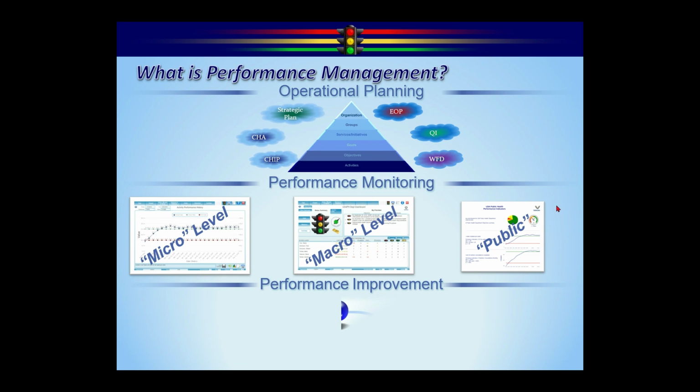The final step kind of is that performance improvement cycle, PDCA cycle. So you built the plan, you're executing the plan. While you're executing the plan, you're collecting information from everybody responsible for the plan elements through the real-time planning. You're going to use that information to check the plan against the actual, and then you're going to be able to make adjustments if necessary and go back through the cycle. Again, I'm going to walk you through this in detail here in a few minutes.